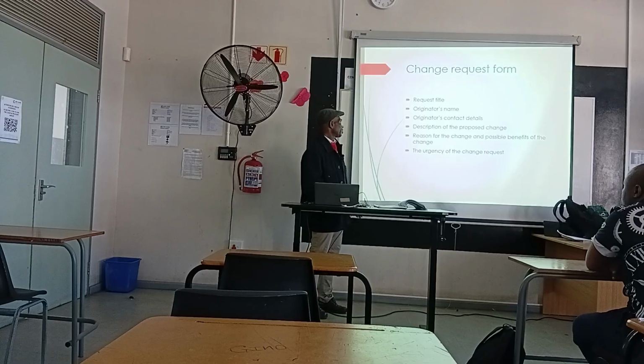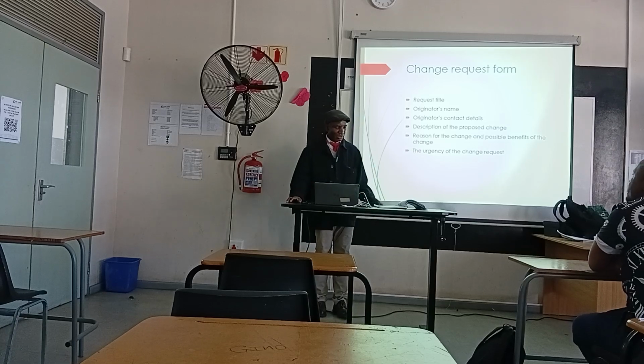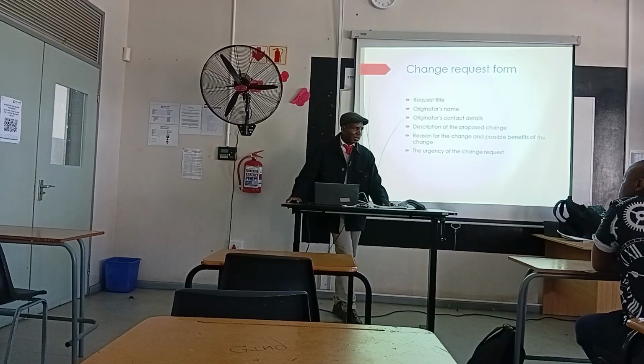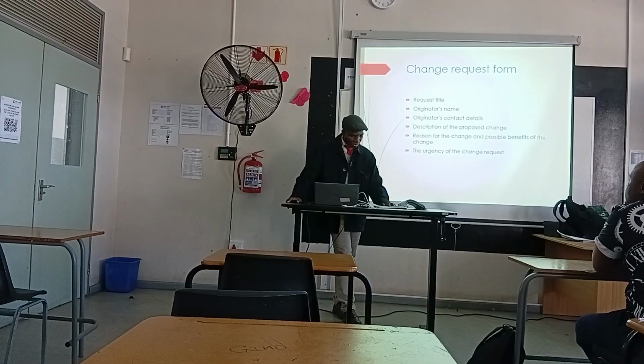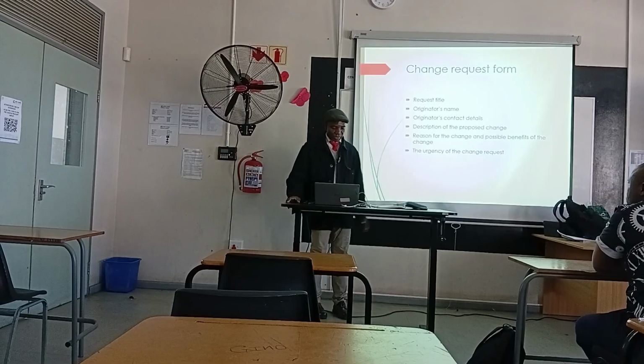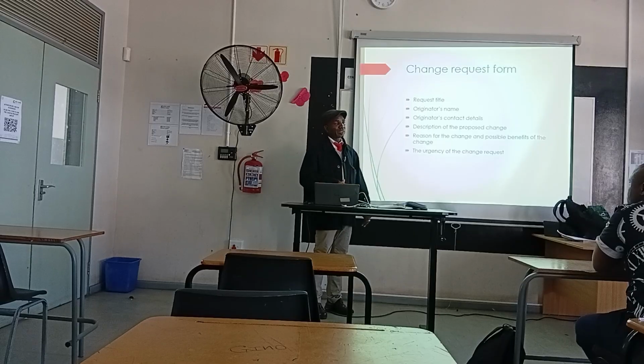a commensurate benefit. Then the urgency of the change needs to be captured as well. If the task that you are suggesting to be done is a new task that was not previously predetermined or part of the project plan, and it is something urgent that needs to be done quickly, then you say it, right? From there, one can establish the urgency of the change request.